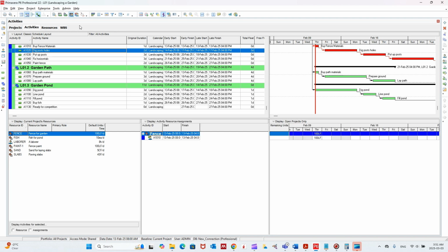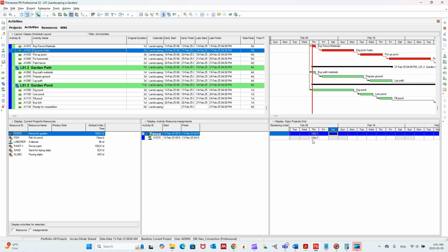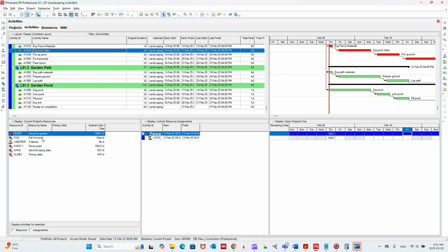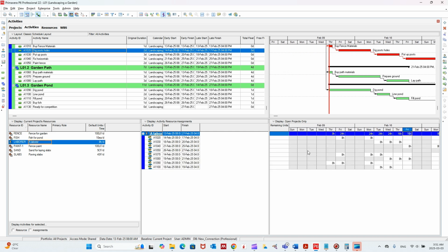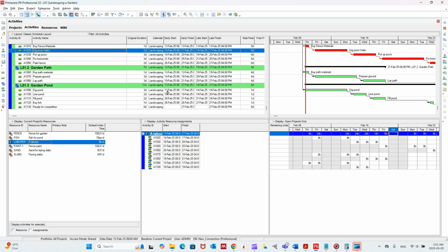Also you can change it to spreadsheet. As you see here, it shows you the numbers, how much of that. So as you see here, the labor, we were saying that's the 24 hours that are needed for the three activities, and you see 24, 24, 24, 16, and 16, and so on. That's the resource usage spreadsheet and resource usage profile.